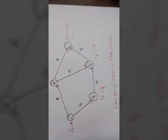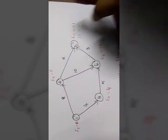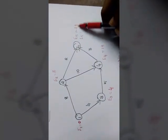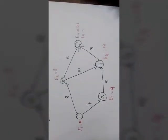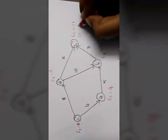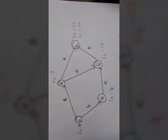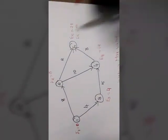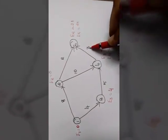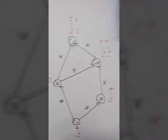Now latest time. So 21 is nothing but the project completion of the whole. So project will be completed by 21 weeks or 21 days or 21 months. So your latest time will be starts from your project completion time. So 21. Next L4. L4 will be 21 minus 3 which is 18.